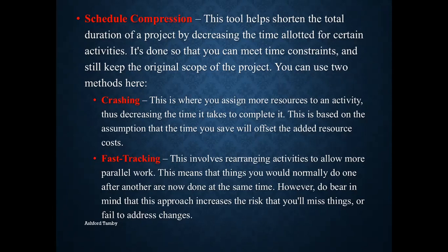What can you do? You might have seen a project manager do something and you just think, oh, they look like they just arbitrarily did this. But there are two things that project managers usually do that are very common. The first is called crashing. And crashing is really when you assign more resources, like it says, to an activity. So you take resources,